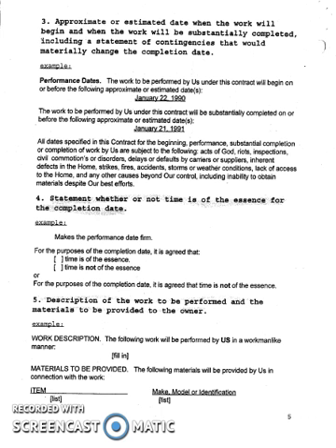This is very important to know that if time is of the essence, there can be significant penalties for the contractor. So don't put in things that may not be true or you may not know of in your contracts. There's a very strong lesson to be learned there. Number 5 is the description of the work to be performed, and then the materials that may be provided to the owner as part of the project.